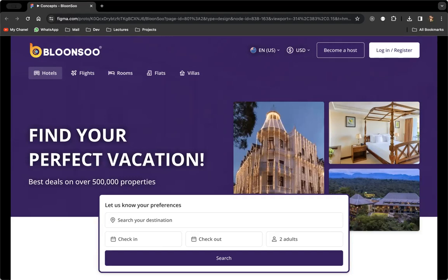Okay. So if you are trying to change the requirement, there are consequences. First thing is the deadline or any commitment that we have made might change. You can't change while we are doing development. It will be changed. So the deadline might extend, or sometimes the deadline might fall. If you are removing something, we might get an earlier deadline. But either way, the deadline will be affected.